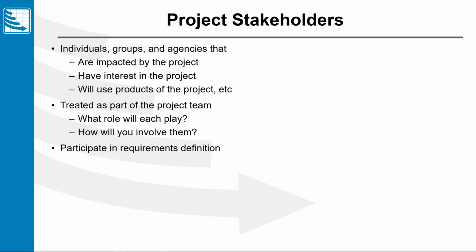If we are doing a project to build a building and we don't acknowledge that there is a permitting agency external to our organization that has certain requirements, we may not even be able to begin construction if we don't have the right permits. That is a stakeholder. The stakeholder, that permitting agency, we are going to reach out and figure out what are the requirements that they have for our project. That's a good example right there, because literally you have to have permits when you do certain types of projects. And you've got to recognize that there are agencies outside of your organization or even inside of your organization that are going to levy requirements on your project. So like I said, we want to capture these individuals, we want to reach out to them, and we want to involve them in the requirements definition process.